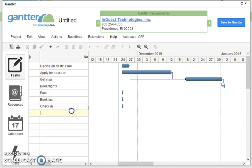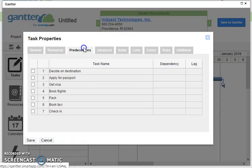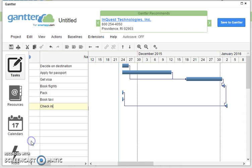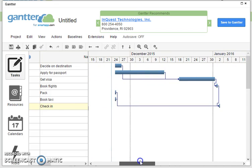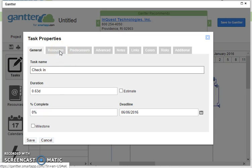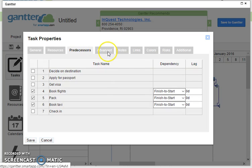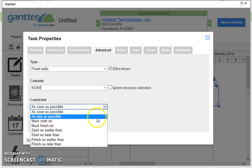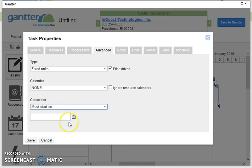But my check-in depends upon certain things, so I've got to book my flight, pack my bag, and book my taxi. So let's set up the predecessors here, there we are, and then save. Now you see it's still putting it as early as possible, so it's trying to check me in way way way before the flight, so what I need to do is put a different constraint on it. So at the moment it says check-in and that's the deadline, but what we want is to, if we look through here, there's your predecessors and advance, I can say let's say it must start on the 6th 6th 2016 and save it, and it's going to go all the way over there.